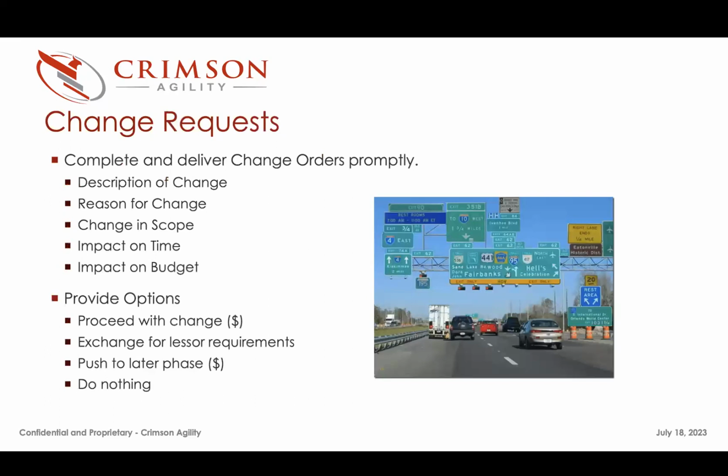Okay, so what are change requests? This is one of the tools that we use to manage change. It should provide a clear description of the change, the reason for the change in scope. So define it as if it were a statement of work, as if it were a legally binding contract of what we're going to do.